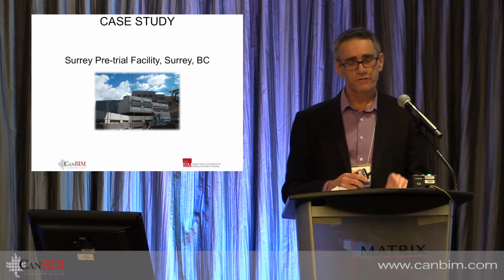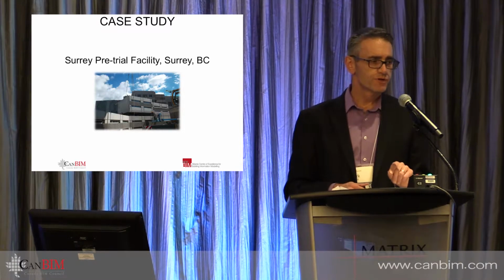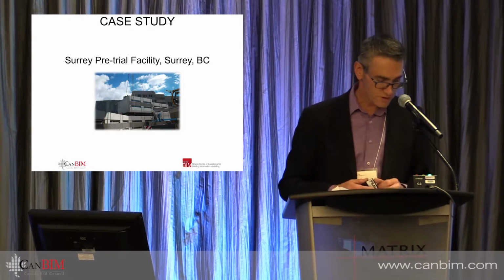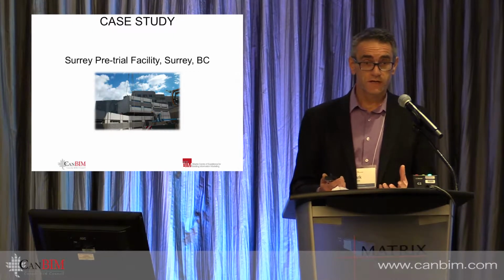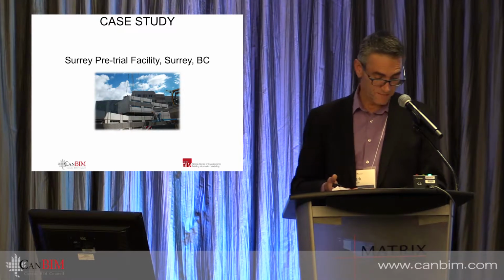That took 4 months off our schedule, which, although that solution was a slight cost premium over the stick-built version, the 4 months financing cost was essentially what won us the job in the end. What we learned from that one was it also took a bunch of the masonry work off-site, which is extremely time-consuming and extremely messy.